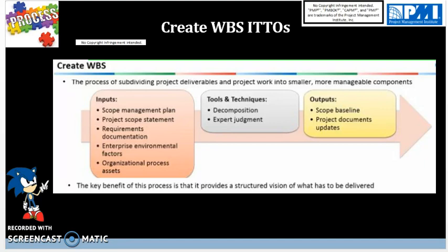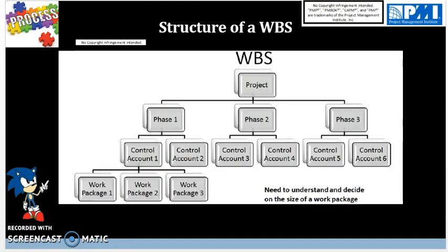And these are the scope statement, which outlines major pieces being delivered in the project, the risks, assumptions, and constraints. That's what goes under the scope statement, as well as the WBS, which is a work breakdown structure, and WBS dictionary, which is a companion document to the WBS, which explains which control accounts and work packages are tied to it. Now, more detail regarding the WBS is going to be shown in the next slide.